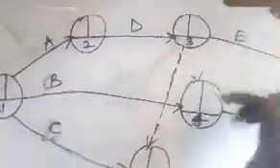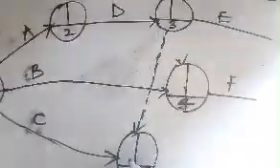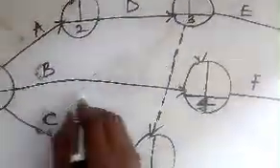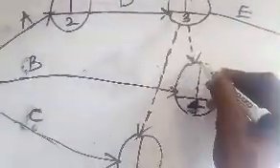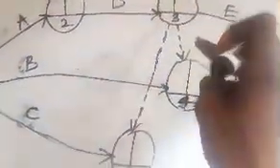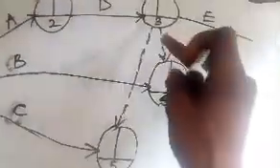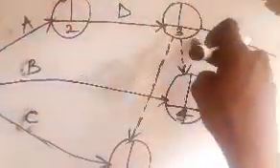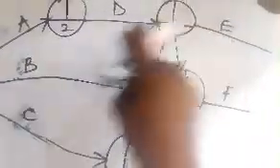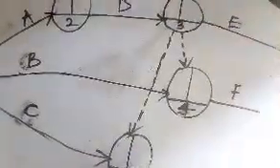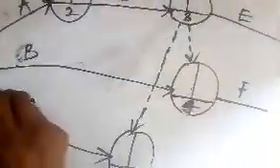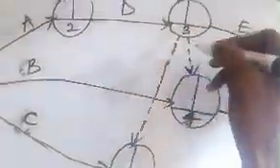And to cross a path, don't forget, they don't cross path, but to cross a path of this B, you use a dummy activity. But here is not crossing path, and still yet we are using a dummy activity. Why? Because this particular one here has a preceding value of A, and from this same node one is coming out that crosses path with this B. So that is the reason we have this as a dummy activity.